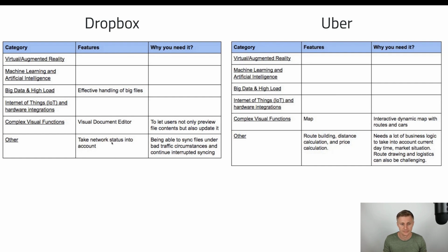Just like that. Also, these days Dropbox provides online document editing. It provides a set of rich widgets like timeline, import of external files, to-do list, and many more. To develop such a sophisticated visual online document editor, it will take not less than a few weeks for a developer just to develop a quick prototype. So I will also need to put it into this table for us.